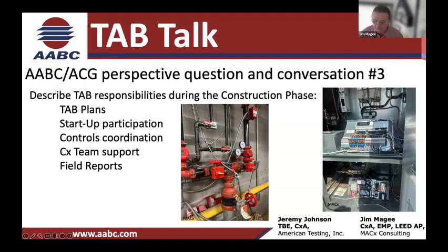What about field reports? I mean, are you guys leaving something behind whenever you show up? One of my big things is the mystery guy. He shows up, works his ass off, and then I don't know anything that happened for 3-4 weeks. Our practice is every guy, all the work that he does every day has a field report behind it, as far as what was accomplished, what was done, and we have open logs, action item list, efficiency log, whatever you want to call it. And those are communicated regularly with the person that we're working for, whether it be the owner or the mechanical contractor.